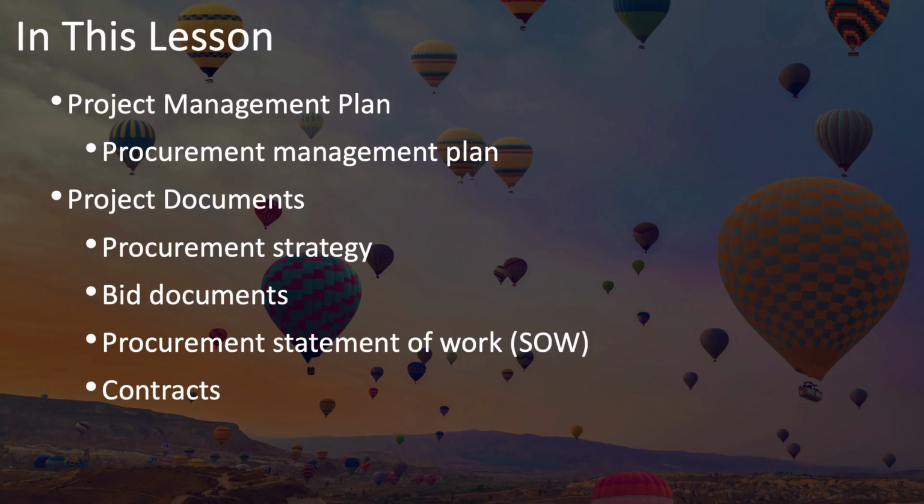Notice here at this point the Procurement Statement of Work, or SOW for Statement of Work. This is a term that is used only in the context of procurement, at least within the PMBOK guide. Other areas that include things that might be similar to a statement of work or may have been called statement of work are things like the project scope statement. But don't confuse that with the statement of work, which is only used in the procurement context.